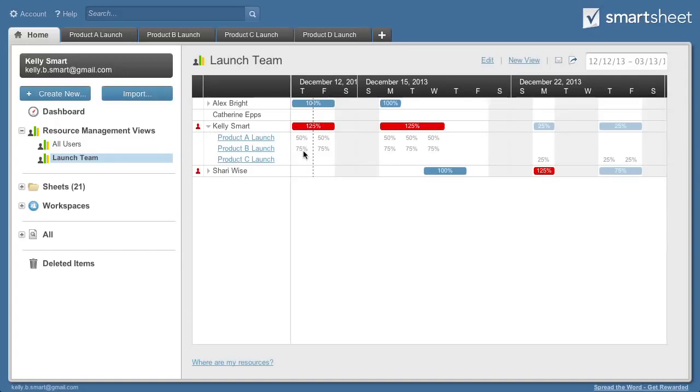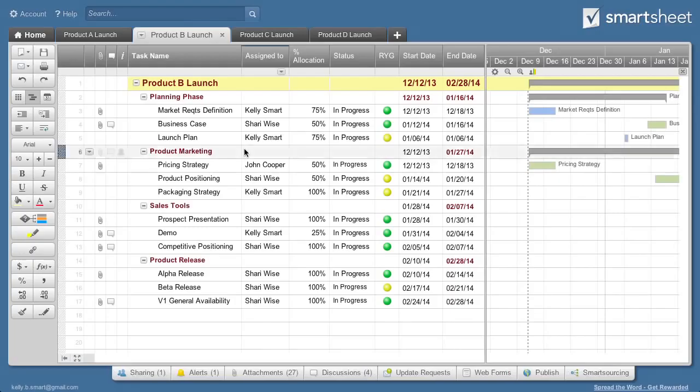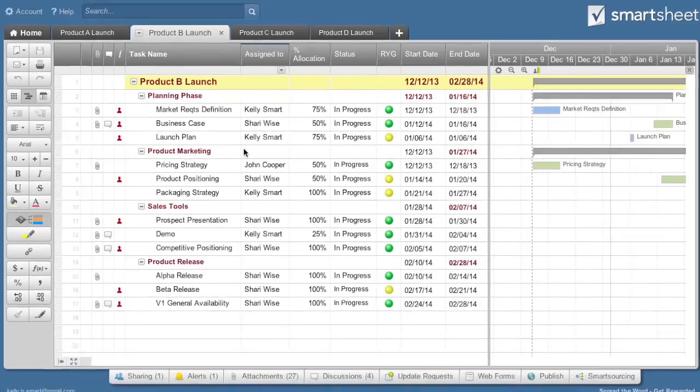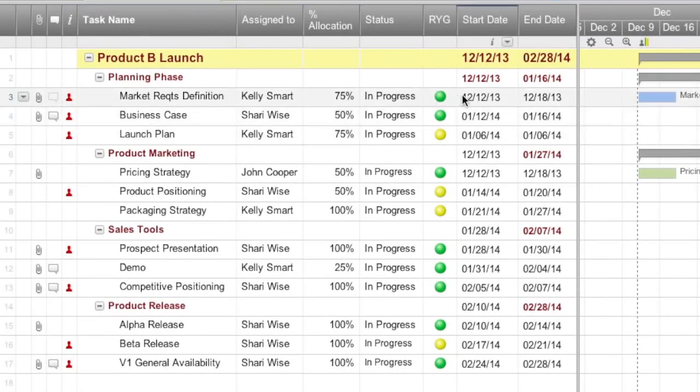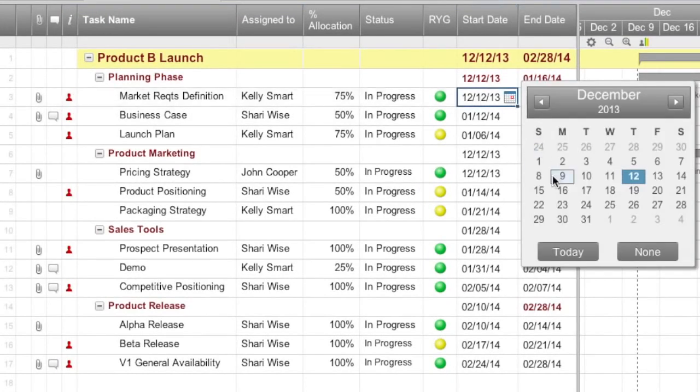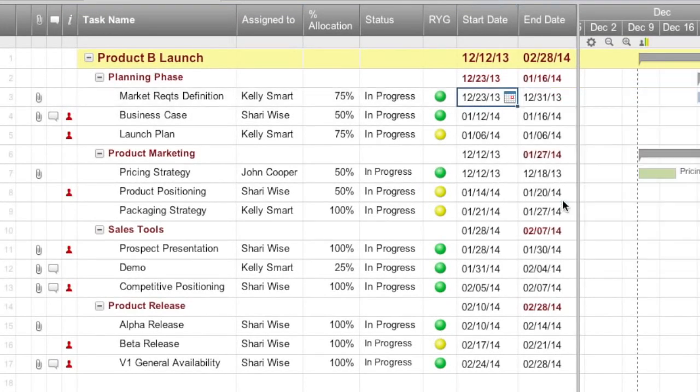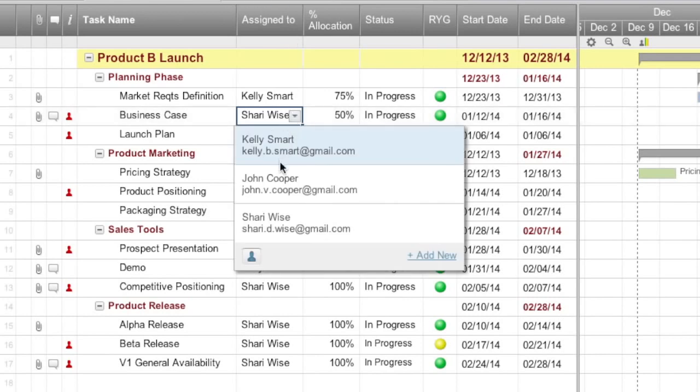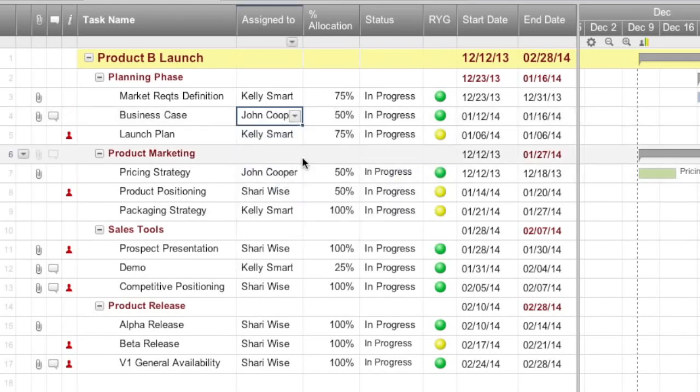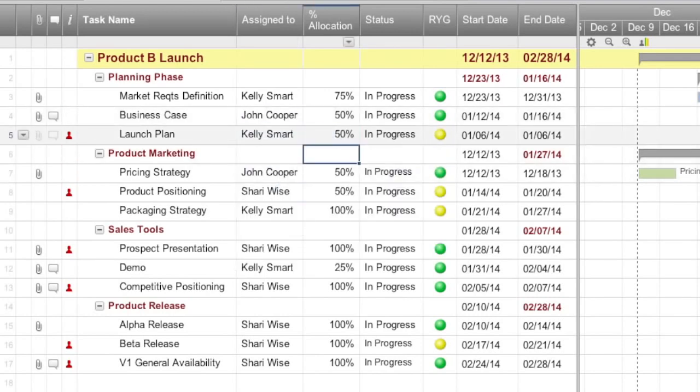If a project you've created or been shared to is causing an over-allocation, you can go directly to that sheet and resolve the over-allocation in real-time by making adjustments to start dates and dependencies, reassigning tasks, or adjusting allocation percentages.